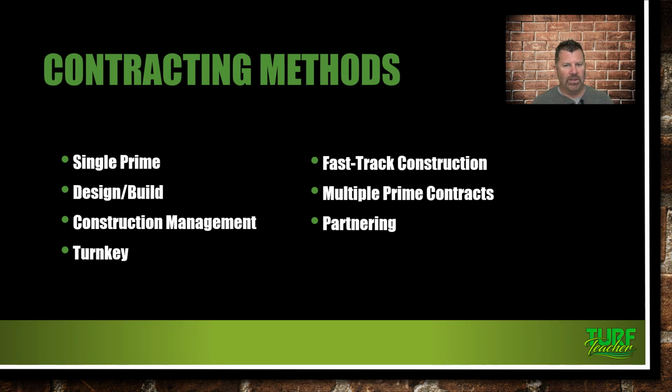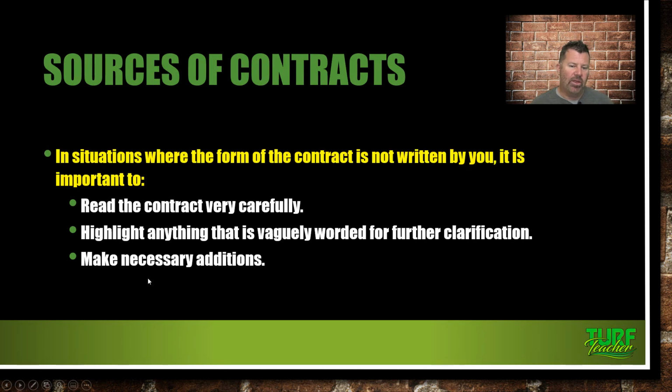Then there's design build, where you may have an architect on staff that you are doing the design and the build of the project. Then there's the construction management. You're paid a flat fee to manage a project. Turnkey, that's again all one price. Here it is. Here's the keys at the end. Fast track construction, get it done quick. And then partnering up. You may partner up with another builder who is really good with concrete, and you guys are really good with steel framing, and so you kind of partner to do a particular job.